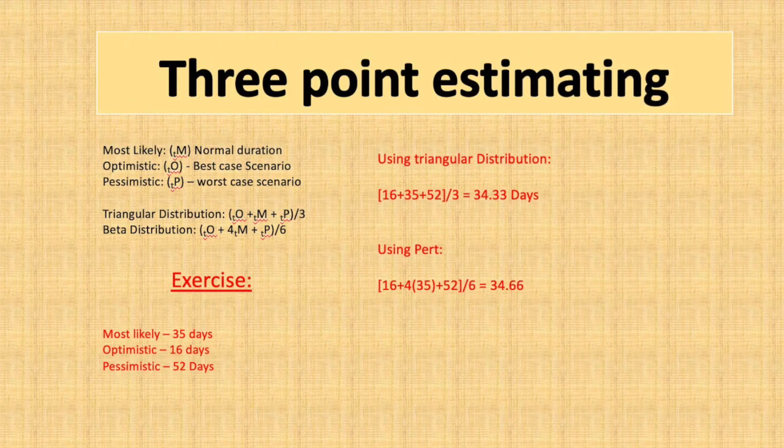If we use PERT technique, our answer will be more toward our most likely duration that we have entered. If we use 3-point estimation, it will be an average.